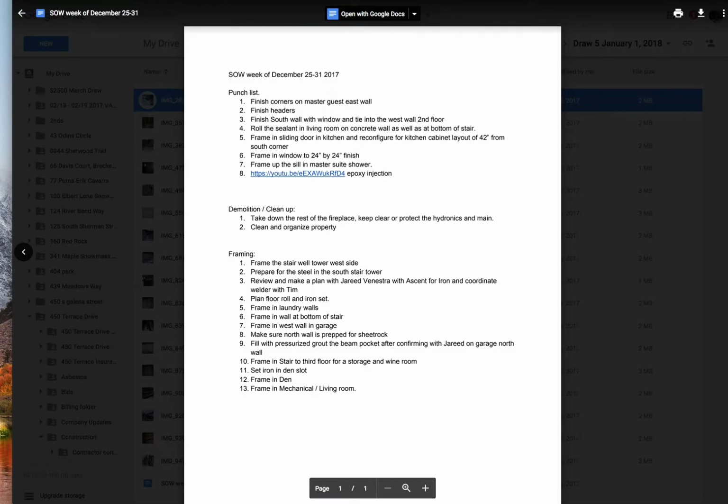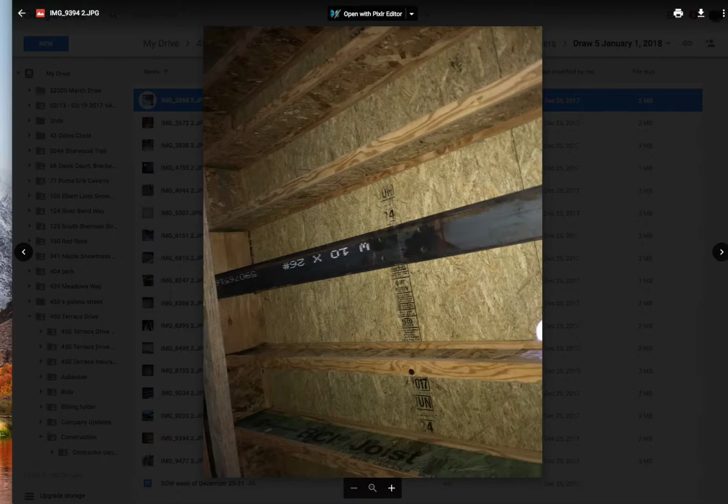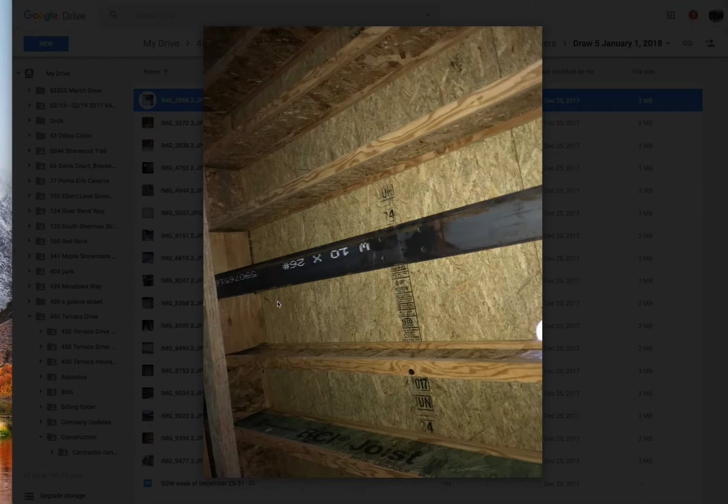We're ready to complete our iron and our framing. So we're hoping by this week, by January 7th, we should have all of our iron takeoffs done and our installs. We've already started installing via weld. We've done everything we could with bolts. So now we're on welds. This is some of the bolting, but now we're on all the welding. We've already done one welded bracket. We have some moment frames, which is a combination of welds for not only your columns but also your I-beams.